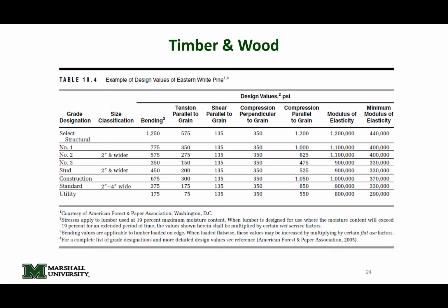Now, what happens with those higher grades of stresses? The lumber costs more, right? This is why, if you're going to purchase lumber or timber products, the higher the grade, the more expensive it is. But also, the higher the grade, the lighter the sections that you're using. So it's a trade-off: lighter equipment on site and faster builds, but you might be paying more. It just depends.